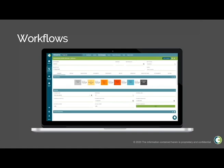O3 supports as simple or as complex of a workflow and approval process as needed by the client. We've seen work packages with as few as 3 steps all the way up to as many as 26 steps, depending on how complex the work may be or the maturity of a contractor. We can support processes around RFI tracking, work package release, constraint removal, deliverable sign-off, and more. O3 can be configured to provide a virtual approval process, again with that historical backlog, to see when an item has been approved, what stage it's in, and if it needs to be escalated, depending on its due date and priority.